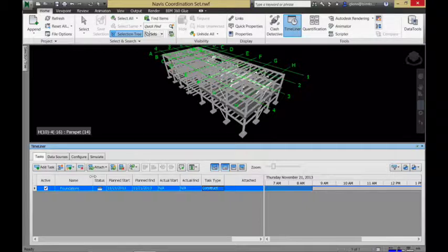or Primavera. You do your project planning somewhere else, but again, in the Swiss Army knife of file opening, it just pulls in a schedule and uses a schedule. So we can bring in some schedule activities. Every type of activity has some notion of a task type, whether it's construction, demolition, or temporary. And there's the notion of attaching things to it. So what happens when we attach things to a task is those elements will be considered to be constructed or demolished at that point in time. And we can run a simulation.